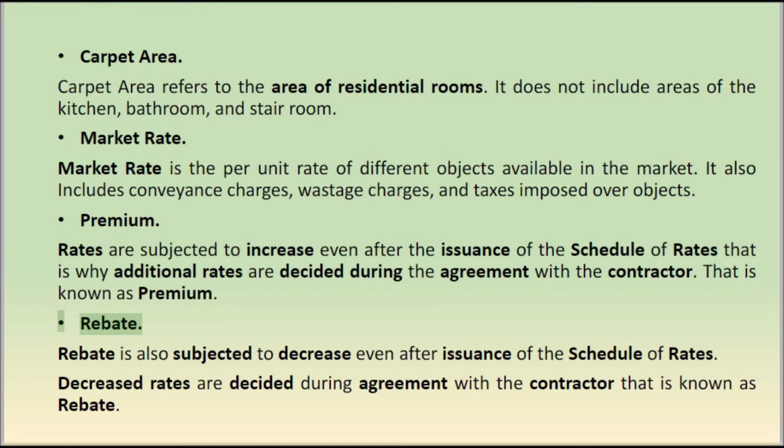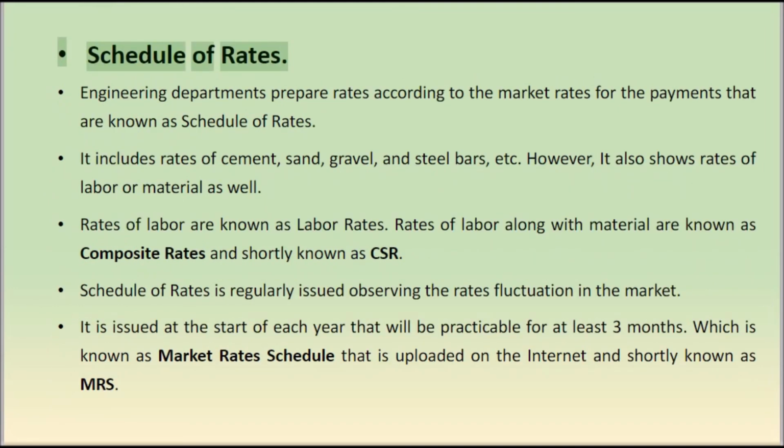Rebate. Rebate is also subjected to decrease even after issuance of the schedule of rates. Decreased rates are decided during agreement with the contractor. That is known as rebate. Schedule of rates. Engineering departments prepare rates according to the market rates for the payments that are known as schedule of rates.